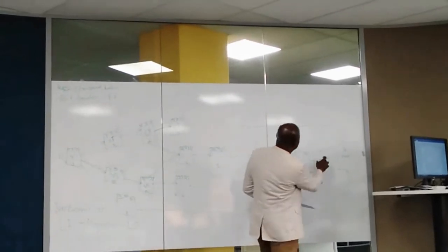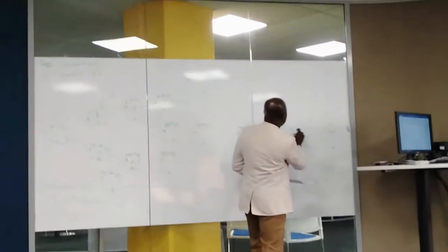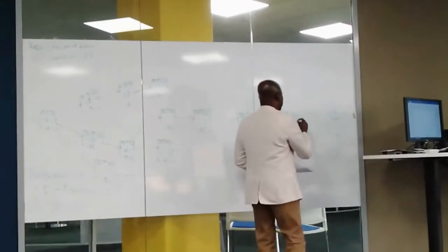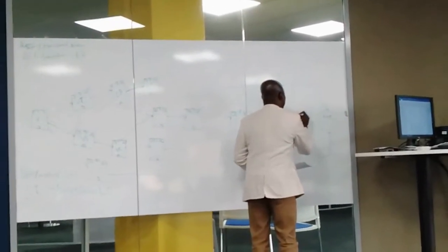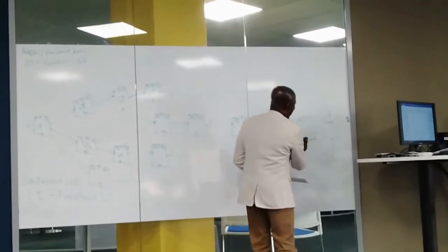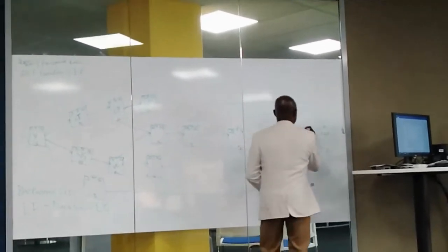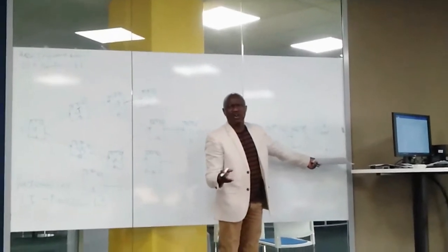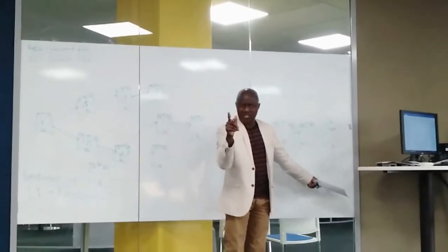Now, activity 13 can only start after activity 12 is completed. And activity 12 is 46. We carry it here, and we add its own day to it. It becomes 47. You can now see that the end of this activity can only be 47 days, not 66.